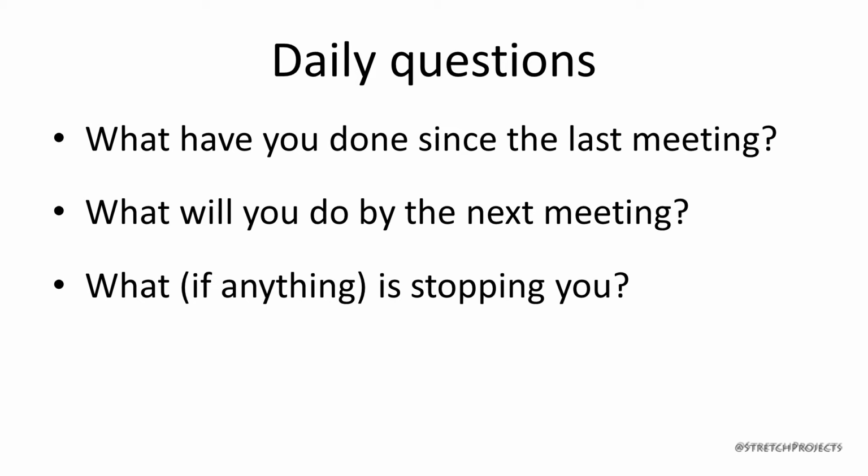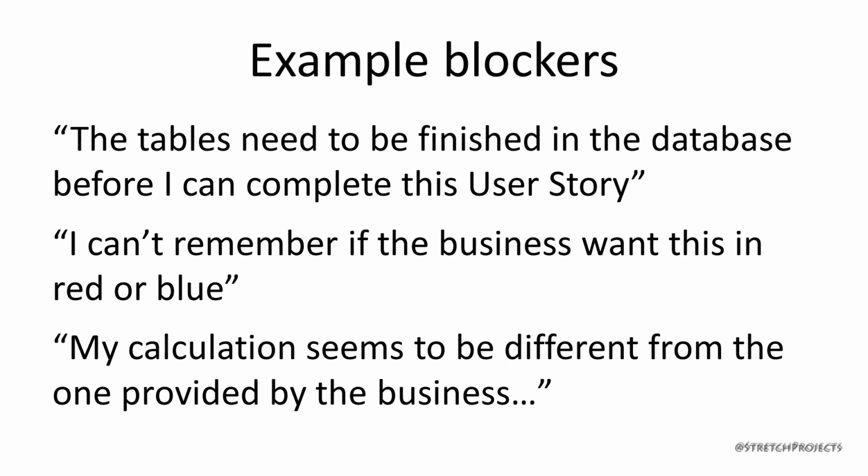This is where the individual developers talk about what they've done. So for example, if a developer has completed a user story, they would mention that fact here. They would also mention any user stories that they're intending to take before the next daily meeting. And then if any of the other developers were thinking about taking those same stories, they have the opportunity to discuss that fact there and decide who is better suited to do that user story. If there is anything stopping the developers or anyone else involved with the project from actually achieving those results that they set themselves, this is where they would mention them.